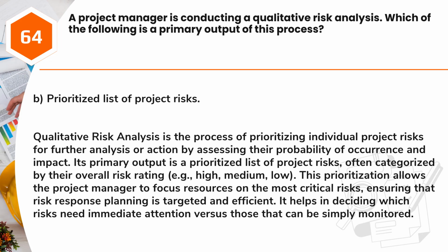Answer: B. Prioritized list of project risks. Qualitative risk analysis is the process of prioritizing individual project risks for further analysis or action by assessing their probability of occurrence and impact. Its primary output is a prioritized list of project risks, often categorized by their overall risk rating, e.g., high, medium, low.